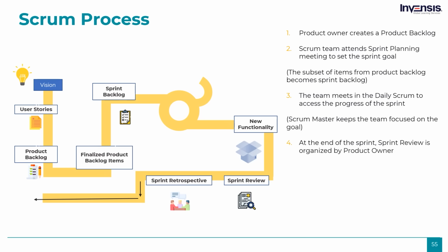At the end of each sprint, the development team delivers a functioning piece of the product to show for their work. The development team holds a sprint review to demonstrate what they have accomplished during the sprint. Any stakeholders, senior managers, and other affected departments such as marketing, customer support, and others are invited to attend and give feedback. After the sprint review, the team gathers for a sprint retrospective to discuss what went right or wrong and areas for improvements for further sprints. They make tangible plans for how to improve their own process, tools, and relationships.